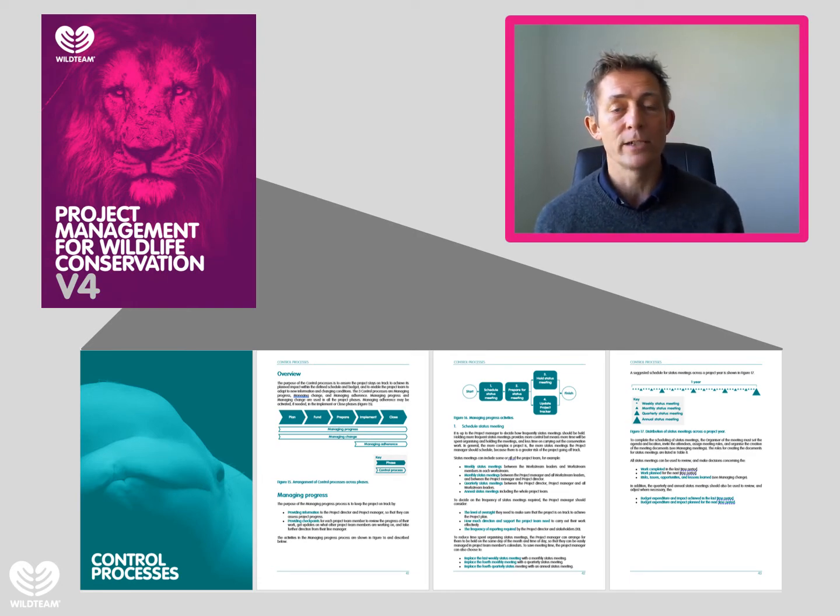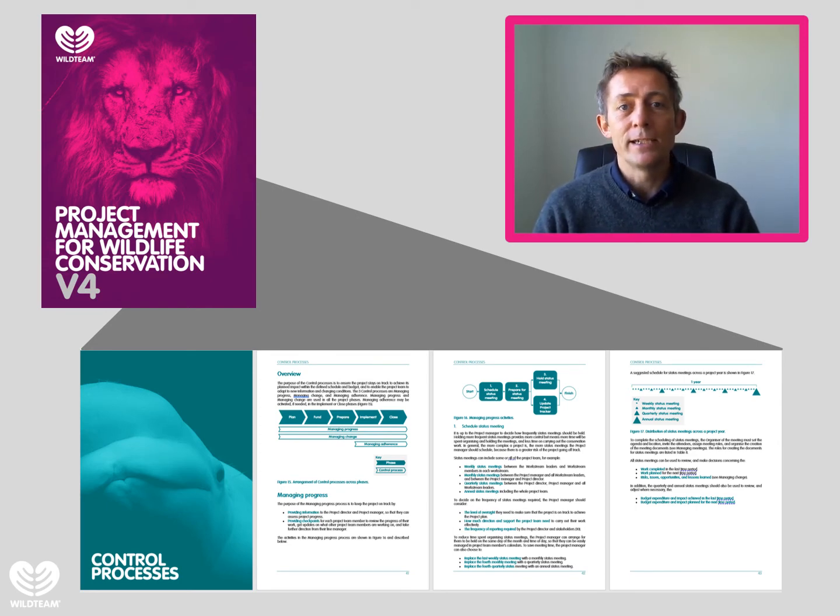What is this type of new information or changing condition, and how do I manage that? And this section gives you guidance on that. So when we're talking about managing change, you're basically managing either lessons learned, something that you found out can help you manage the project more effectively, or didn't work very well, something where you can update how you work very quickly. You have risks, where things that haven't happened yet, but if they did happen, they would be detrimental to your project. You have issues, things that have actually happened and are causing problems to your project.